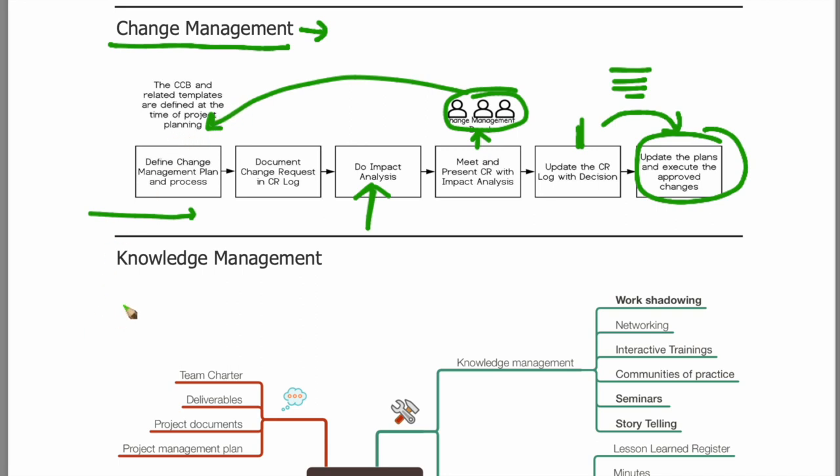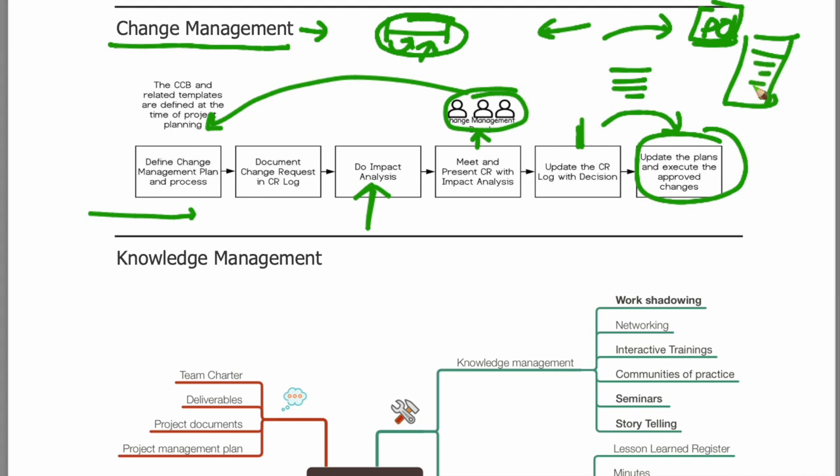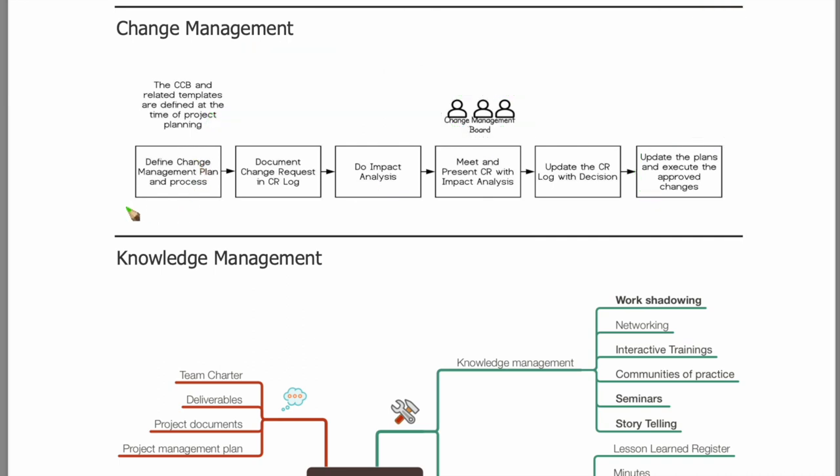Just recall that discussion. Agile is change based. The iterations are very small. So no change from the stakeholders are entertained within the iteration. In case somebody asks for a change, you refer them to whom? Product owner. The product owner decides. The product owner has this big document. What is this document called? This document is, you guys know it, it has PBI items, product backlog items. So product backlog items based on, whatever is the change suggested. If the priority is high, it goes up. And in the next iteration of planning, it is discussed, and then if required, implemented.